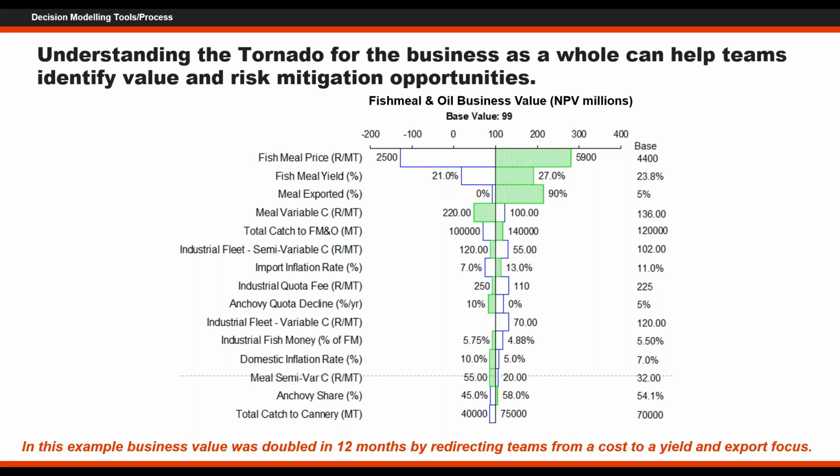So one of the big biases that humans have is that we believe more than we know that we know more than we do, and we don't stretch our ranges wide enough. So we're often surprised. In fact, there are many demonstrations when people have calibration training, that before you have calibration training, 50% of the events fall outside your 10-90 range instead of only 20%. So number one is we're going to have to look forward into the future to anticipate what might happen.